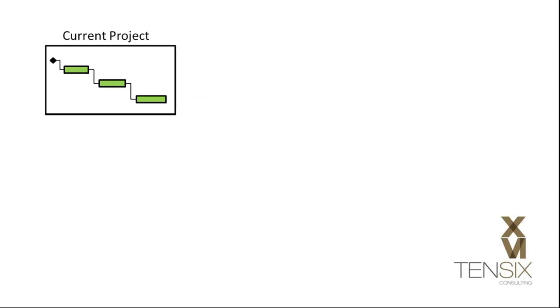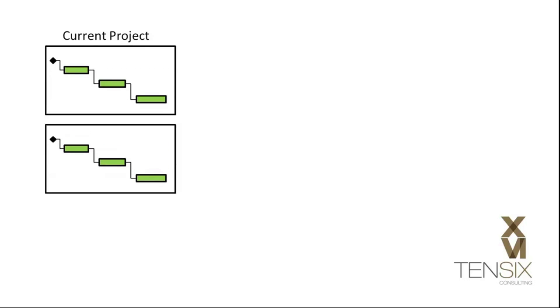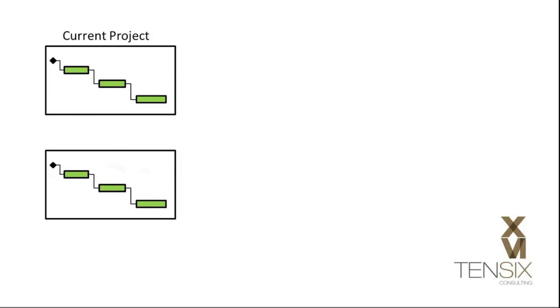In P6, a baseline is used to take a special copy of your project plan and use it for comparison once the project gets underway.